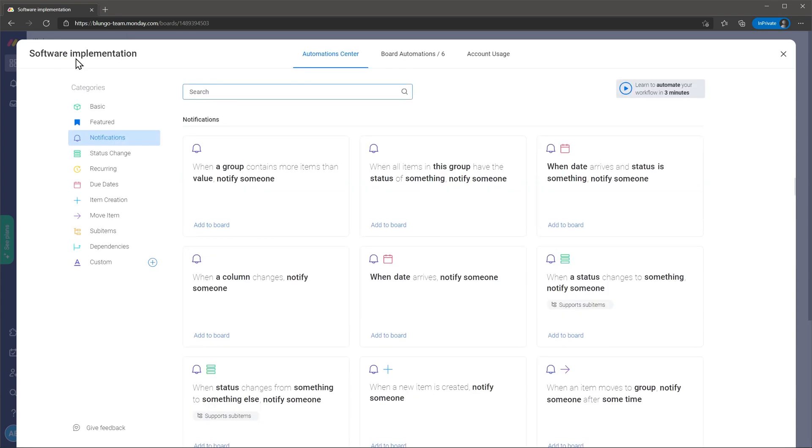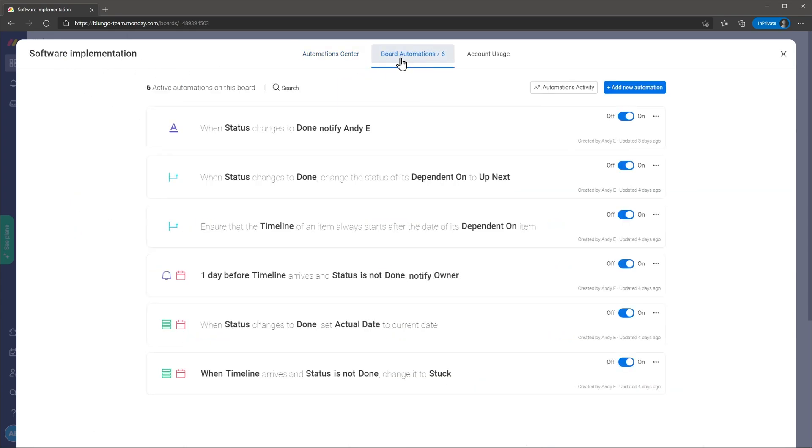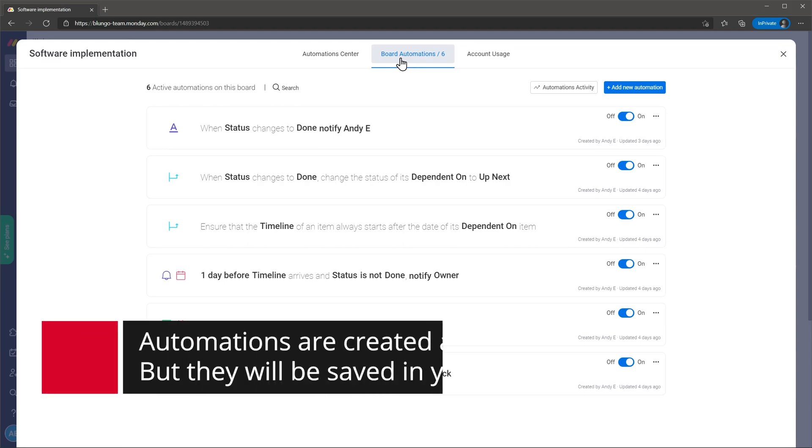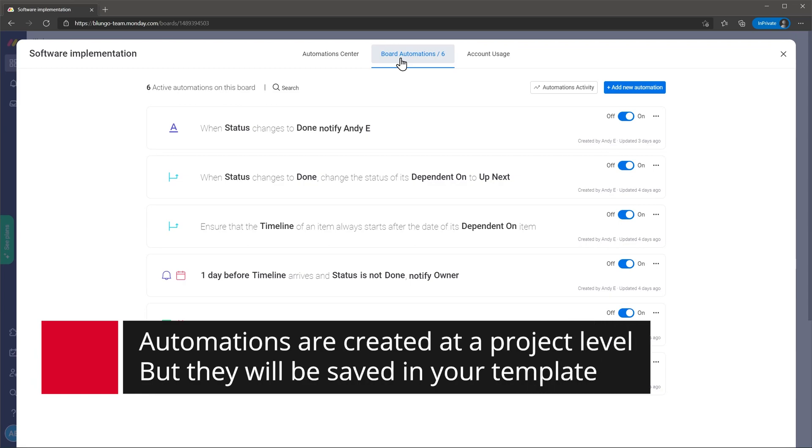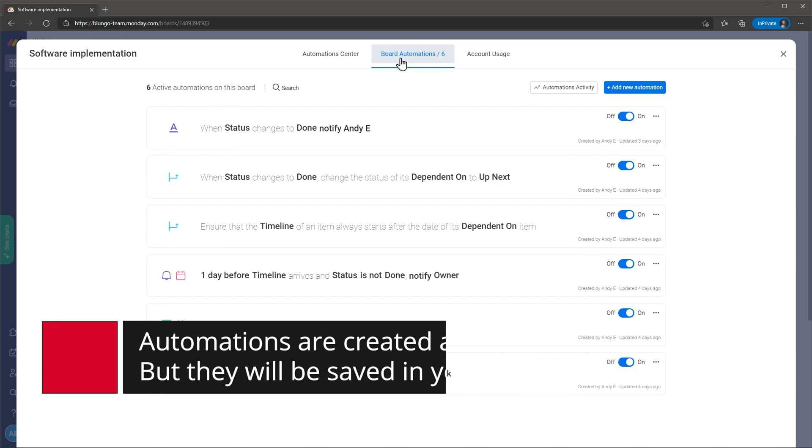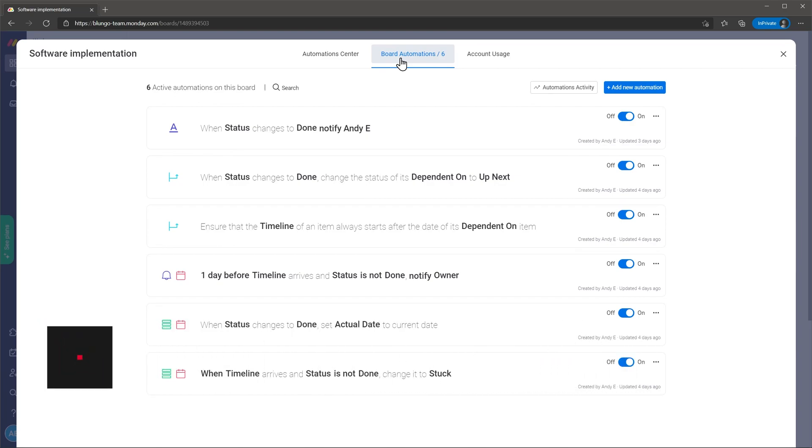On the boards automation tab you can easily see all the automations related to each project and also turn them on or off. Something to keep in mind is that the automations are made at a project level so you will have to create new automations each time you create a new project. But if you save the project as a template the automations will be saved as well.